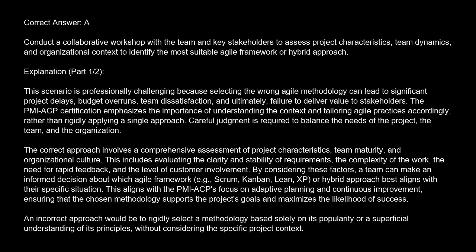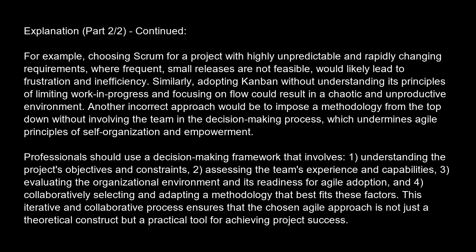An incorrect approach would be to rigidly select a methodology based solely on its popularity or a superficial understanding of its principles, without considering the specific project context. For example, choosing Scrum for a project with highly unpredictable and rapidly changing requirements, where frequent, small releases are not feasible, would likely lead to frustration and inefficiency. Similarly, adopting Kanban without understanding its principles of limiting work in progress and focusing on flow could result in a chaotic and unproductive environment. Another incorrect approach would be to impose a methodology from the top down without involving the team in the decision-making process, which undermines Agile principles of self-organization and empowerment.